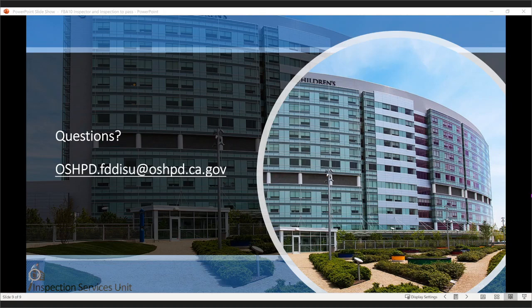And if that person still does not change and wants to cut corners or direct work that's not in compliance with the California Building Standard Code, then we will have another meeting with the directors of facility or whatnot, right? There's always somebody above that person. And we have done that in the past. And if required, we will invite the RCO to attend the meeting and resolve the issue.